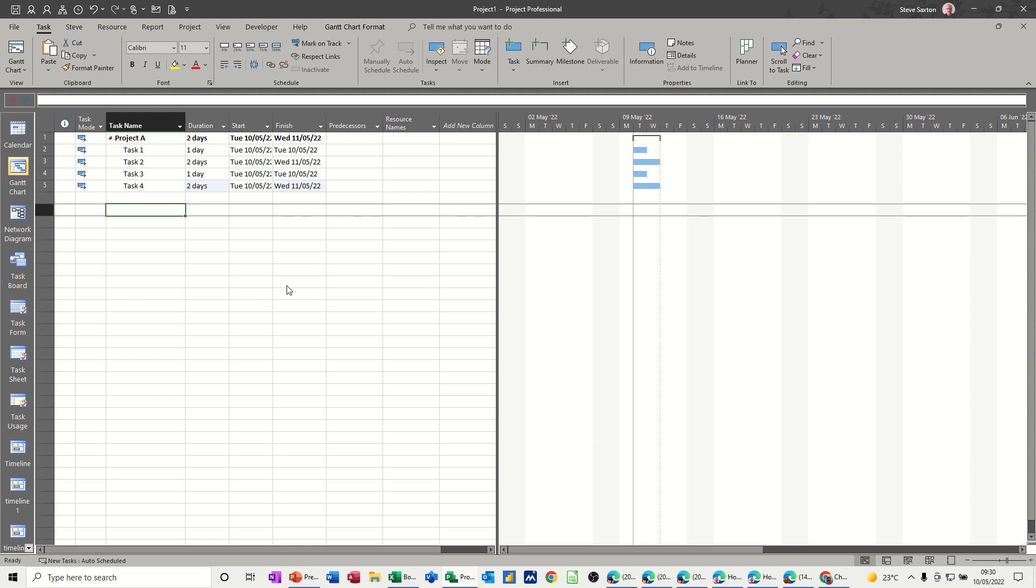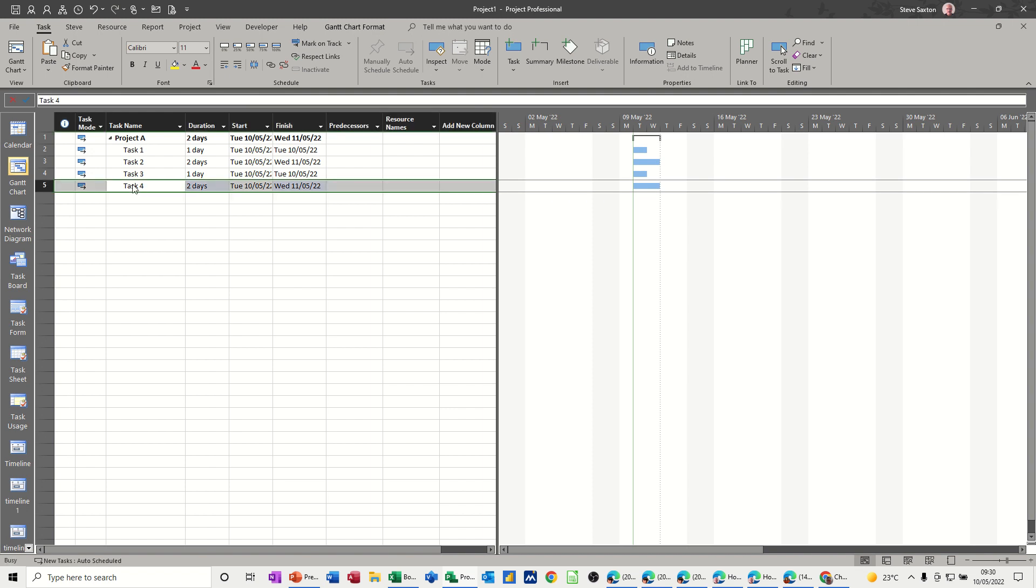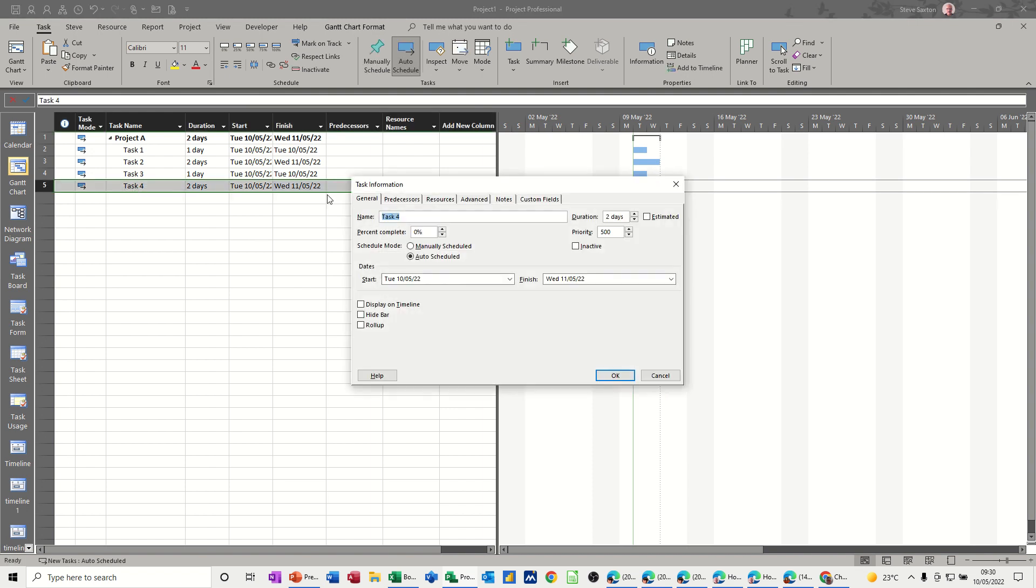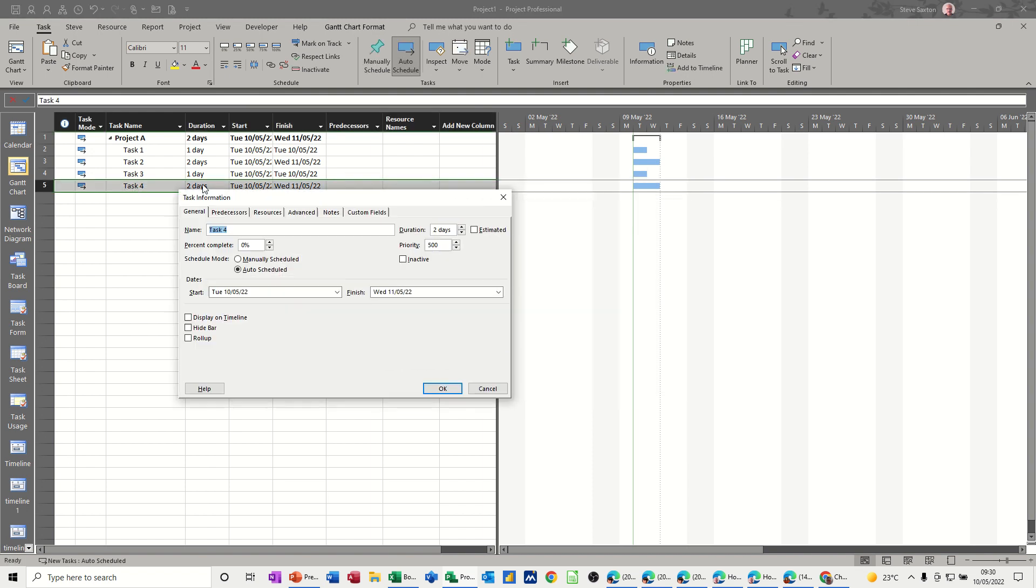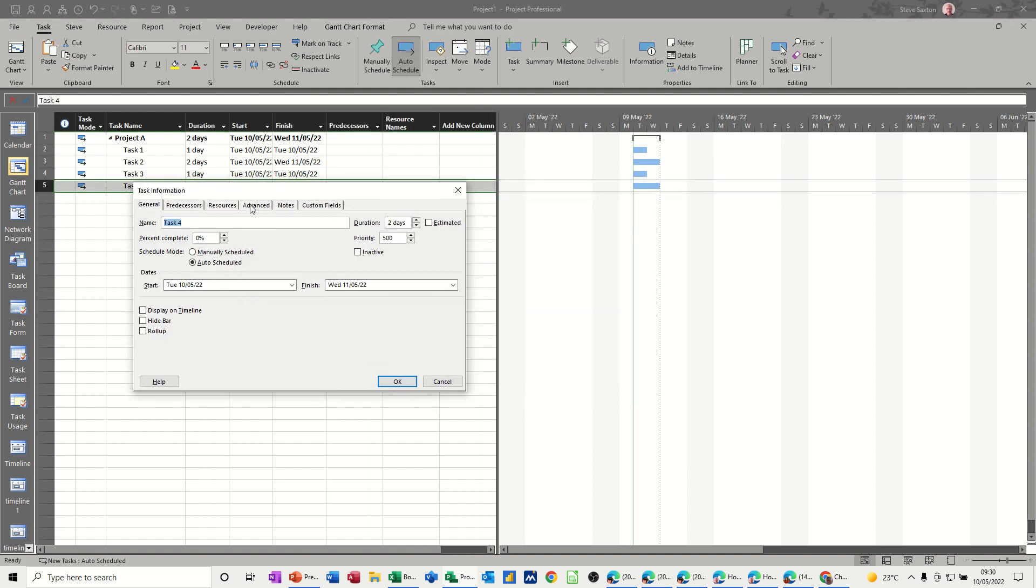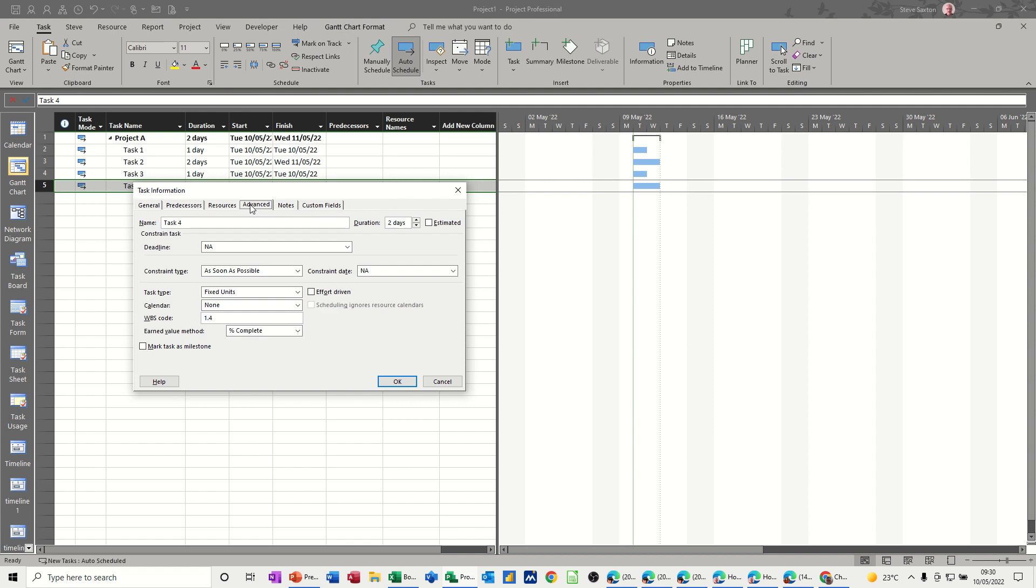So on the screen, I've got several tasks, as you can see, and nothing is linked up. I'm going to go into the task information on one of these tasks just to look at where the constraints are. I'm just going to double-click into task 4. Now, constraints are on the Advanced tab, and you've got this Constraint Type option, and the default setting is as soon as possible if you have a project going from a start date, which would be today.